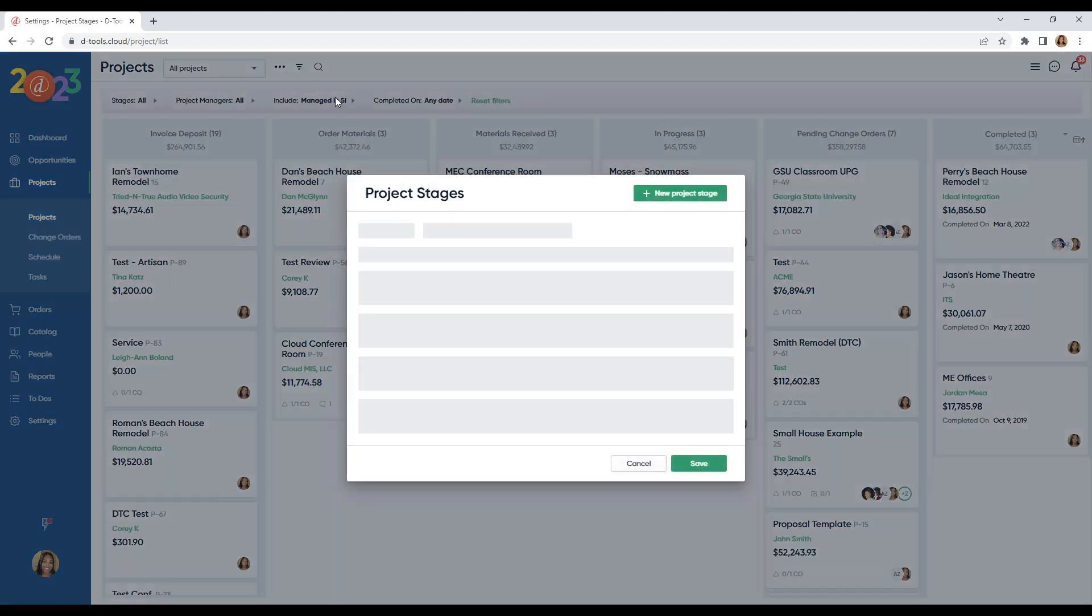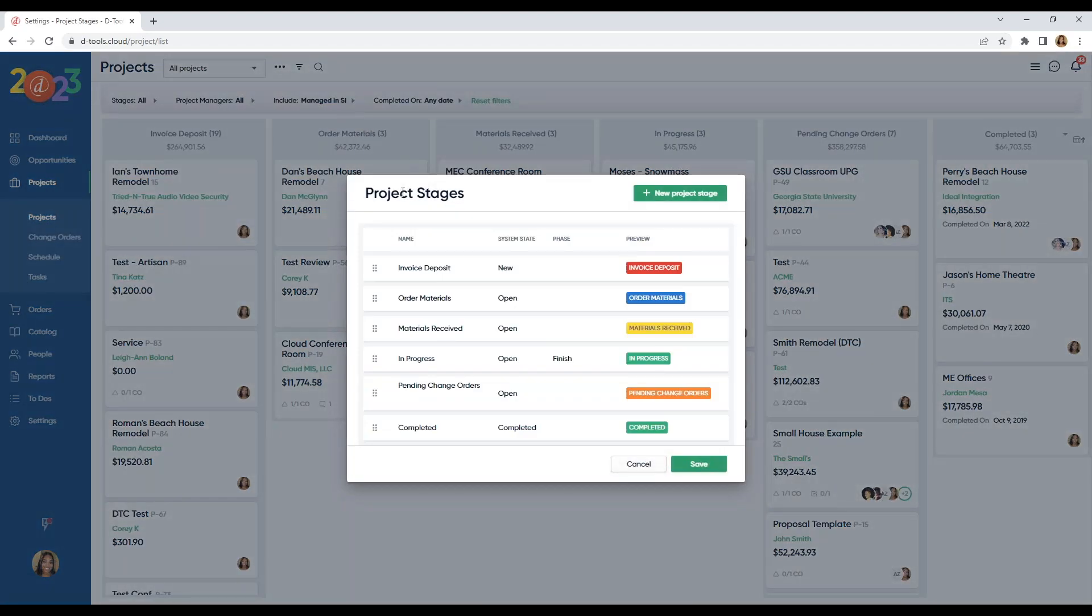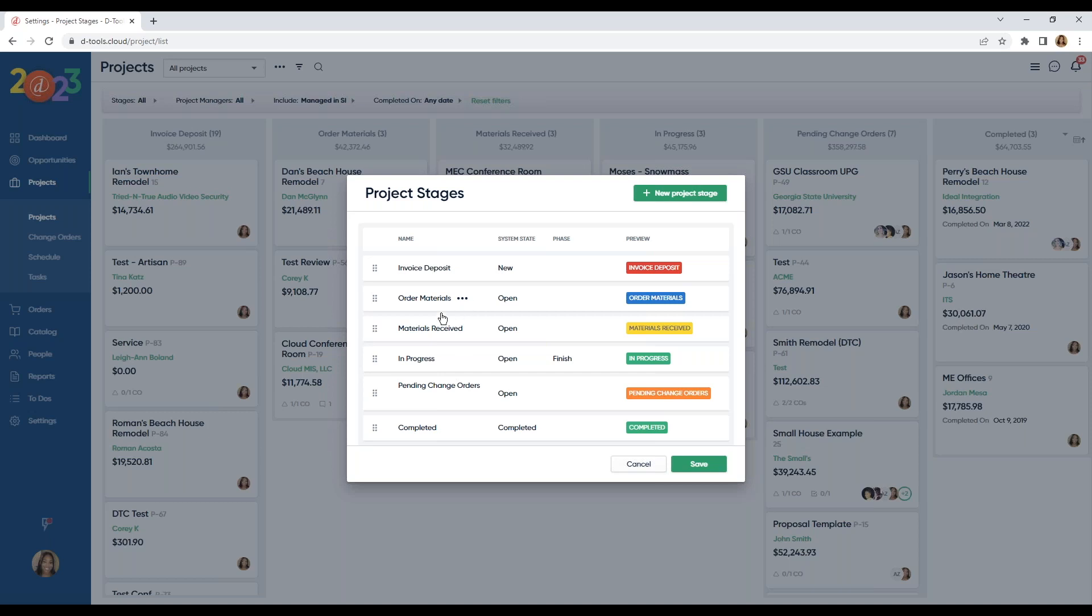This ellipsis here, if you click on that, you can edit these project stages. I have my invoice deposit stage. We're going to order our equipment. We're going to make sure that our materials have been received. And then I have an in-progress column too. And so, this is going to be rough-in, trim, finish, programming, phases like that. And you can always break that out. And then I have my pending change orders column, because we want to make sure that we stay on top of those change orders and get them accepted and signed.